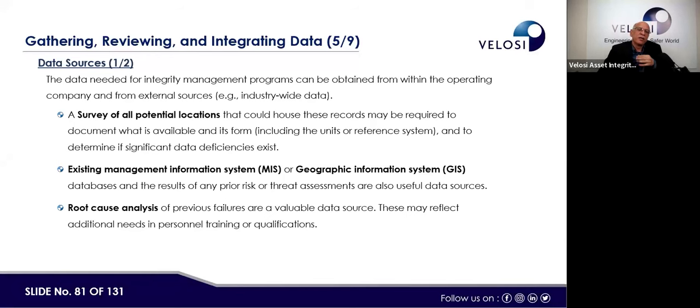When a pipeline is being laid, before it is laid we have to have engineering work, and that engineering work starts from the process design, then goes to mechanical design, then electrical for the CP system. Then there is also the role of corrosion, and instrumentation and controls for the SCADA system.